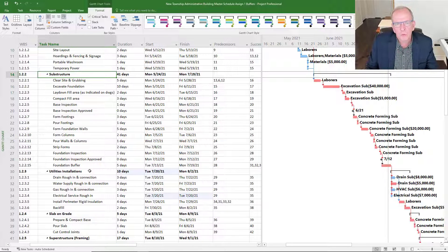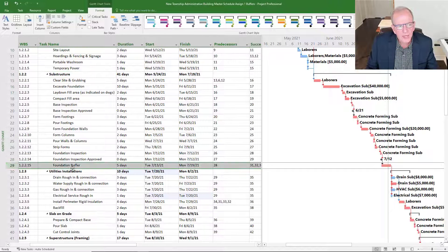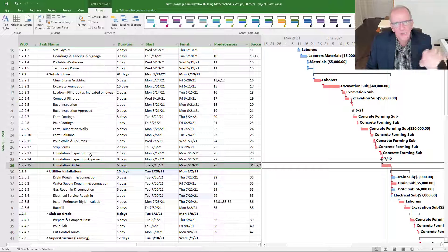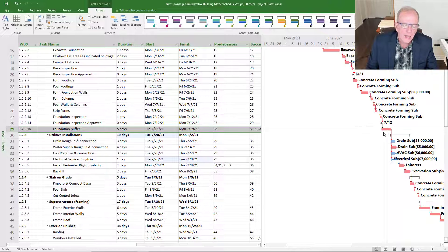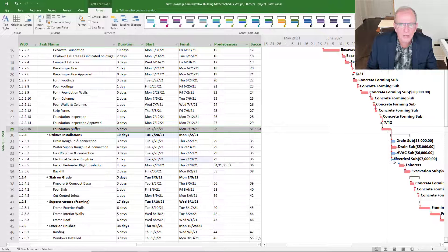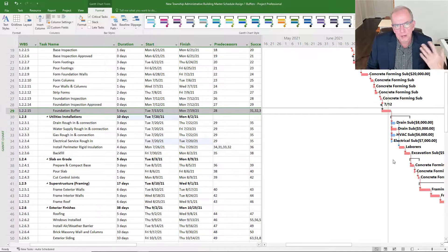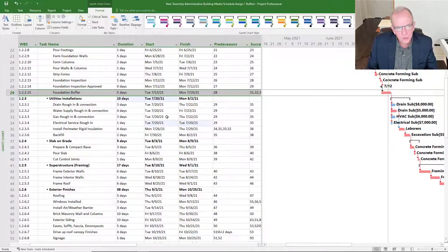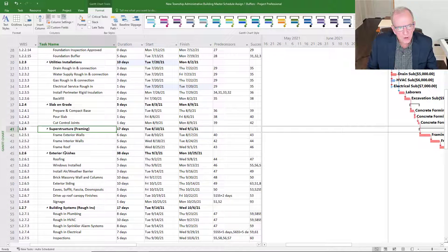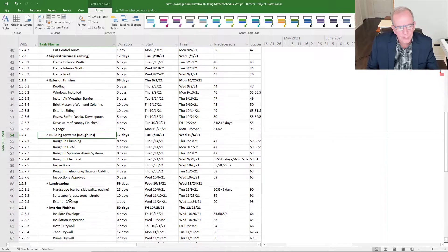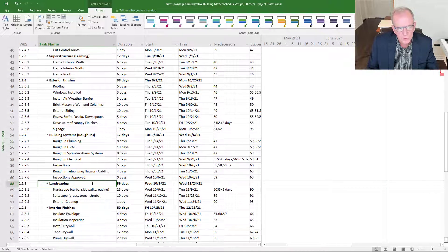You could put that kind of buffer at the end of a grouping of work — perhaps from one milestone to another — inserting buffers that allow flexibility. If you fell behind and didn't use the buffer up completely, you might not even have to reschedule the succeeding work. If you lost four or five days, it would just roll right into the buffer, minimizing the amount of rescheduling you'd have to do. You could do that at different locations depending on the work and the amount of buffers needed.